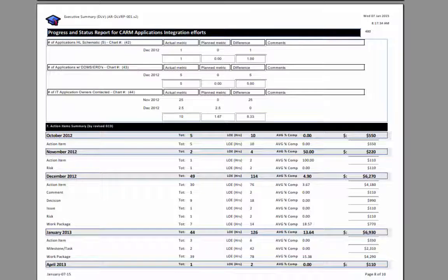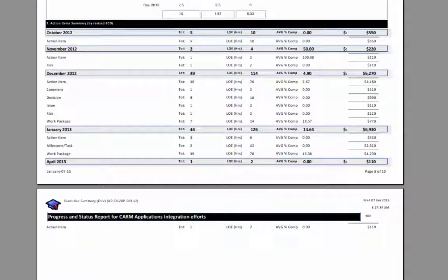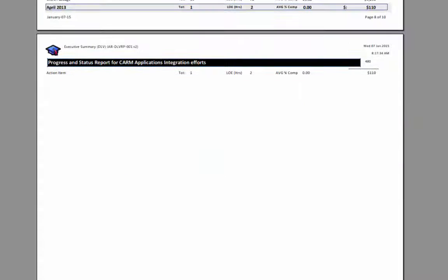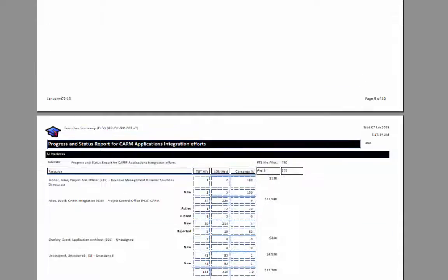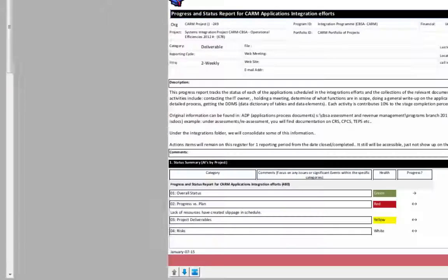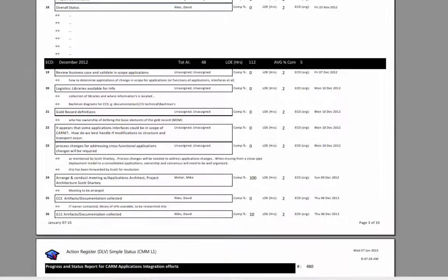and see running totals. The other item here is by the type. We can figure out our level of effort and where effort is being spent, both the hours and completions: are we getting things completed like we expected? And if there was a loaded cost rate, we could put that in. And then here are the resources and their allocation. In this case, this shows that we've allocated 780 FTEs. Our average rate is about $55, and you can change these to what it's costing you. This is another one that is by date and shows you some of the details.